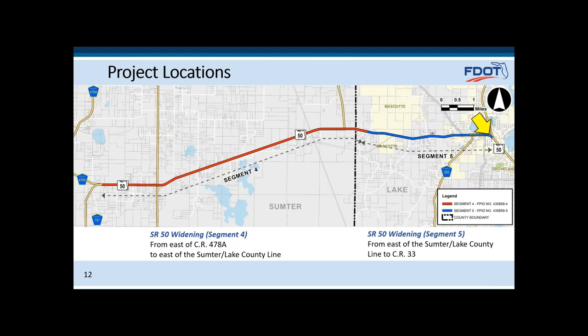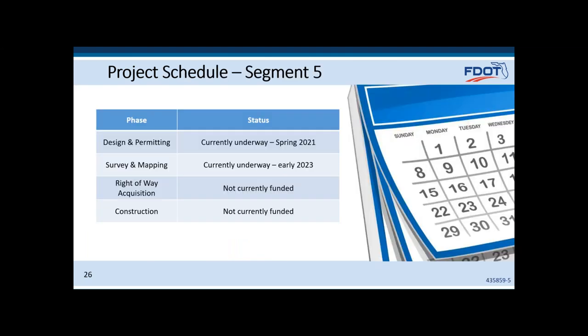All right, I have another question. When will right-of-way acquisition start on Section 5? Do you have 60% plans on Phase 5? Go ahead. Your section, not mine. We submitted 60% plans back in March, and we are working towards our 90% plans at the moment, which will be in January.